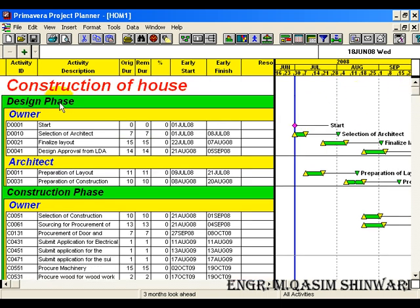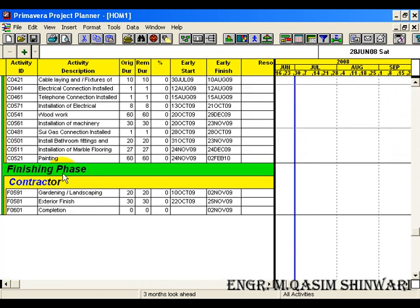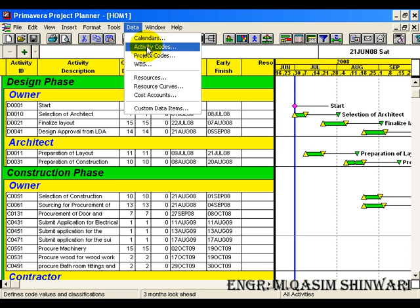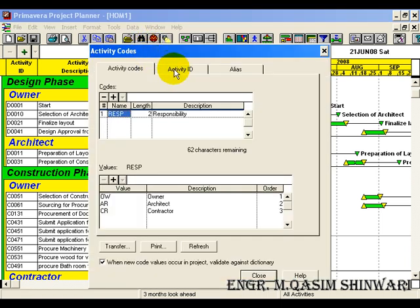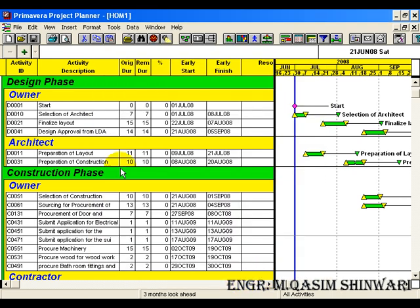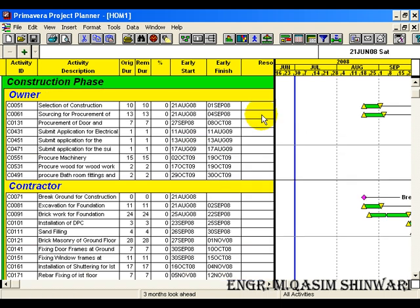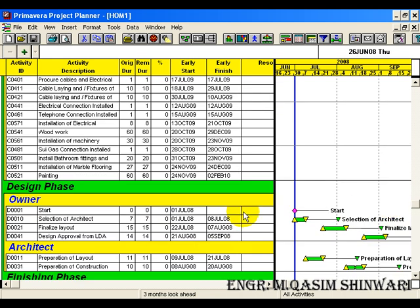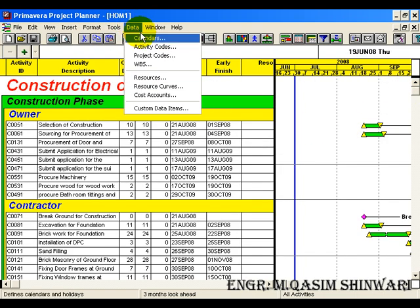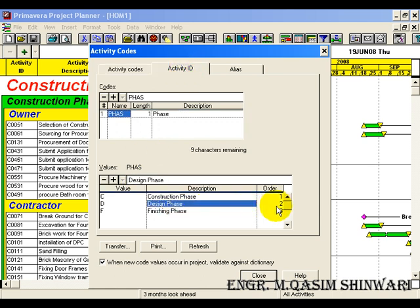You can observe that here we are getting first the design phase, then construction phase, and after that finishing phase. This order is because if you remember in the first video tutorial when we were defining the activity codes, here we gave the design phase order 1. Let me change it to 2 and construction phase to 1. Now construction phase should be displayed at top. Go to Format > Reorganize — you can see that now we are getting construction phase at top, then design phase, and last finishing phase.